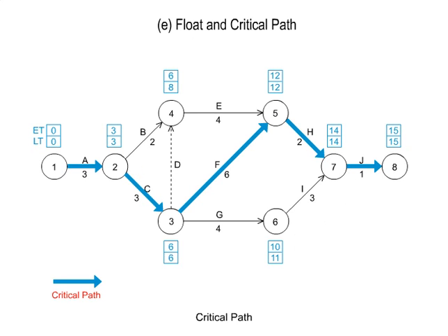A path connecting nodes with zero float is called a critical path. Since a critical path is a path which connects activities without any slack, it is necessary to focus management on the activities in that path. In scheduling, the detection of critical paths is extremely important.